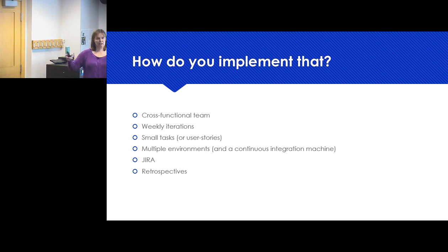Right. And so then we have this idea of, like, we want to build this new thing. Well, building that new thing is really big. That's going to take us more than a week. All right, how can we break this down into things that we can do and estimate and get right? So then, Michael will take a stab at it and say, okay, here's how I think we can break it down. And then he'll actually talk to the developers and say, is this too big? Does this make sense?